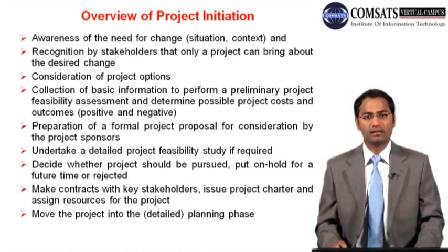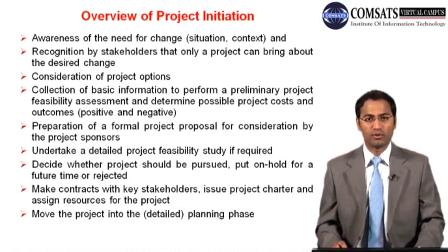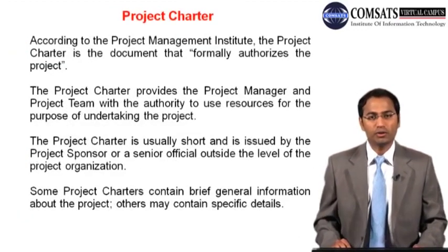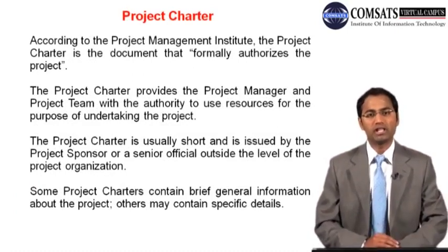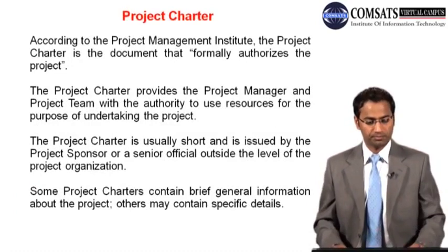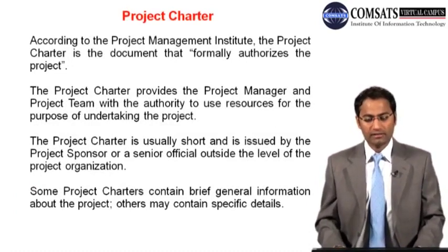Now that is signed by the project sponsor, and that formally authorizes the project team to use company resources. According to the PMI, the project charter is the document that formally authorizes the project. The project charter provides the project manager and team with authority to use resources for the purpose of undertaking the project. And the project charter is usually short and is issued by the project sponsor or a senior official outside the level of the project organization.